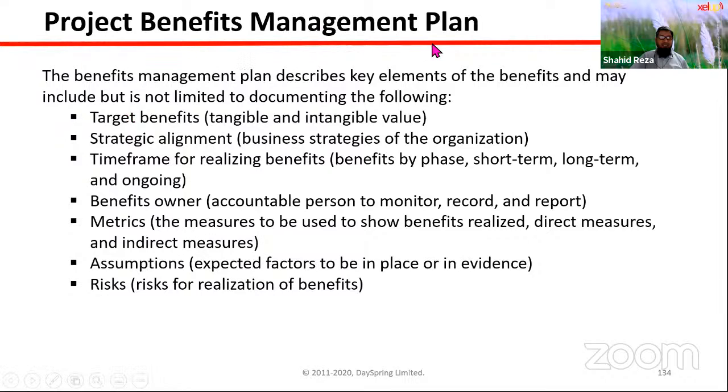So what will be the content of benefit management plan? The benefits you are showing in business case will be mentioned here, target benefits that can be tangible and intangible that we discussed in the first class, tangible value and intangible value. The alignment of the project with your organizational strategy should also be mentioned here. Time frame for realizing benefits, that means the schedule when the benefits will be achieved from this project, short-term and long-term benefits. Then benefits owner, who will be accountable for realizing the benefit.